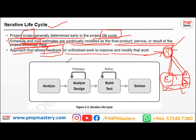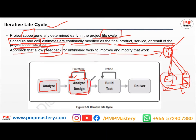In the predictive approach, you may see the car being created in between, but as per the plan you should not be changing the scope. Any change requires following robust structured processes. Looking at the diagram for iterative car development: first you analyze, then design, then create a prototype and give it to the client for feedback so you can incorporate it.